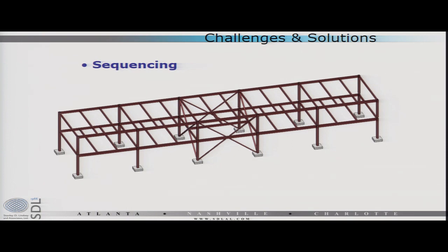Right? The other thing to consider is how much can the erector put up in a day? Right? If he could erect this whole thing in a day, who cares where he started? Right? As long as it could handle the daily wind load during the erection. So you need to have an idea of what the erector can produce. And the only person who's going to tell you that is the erector.